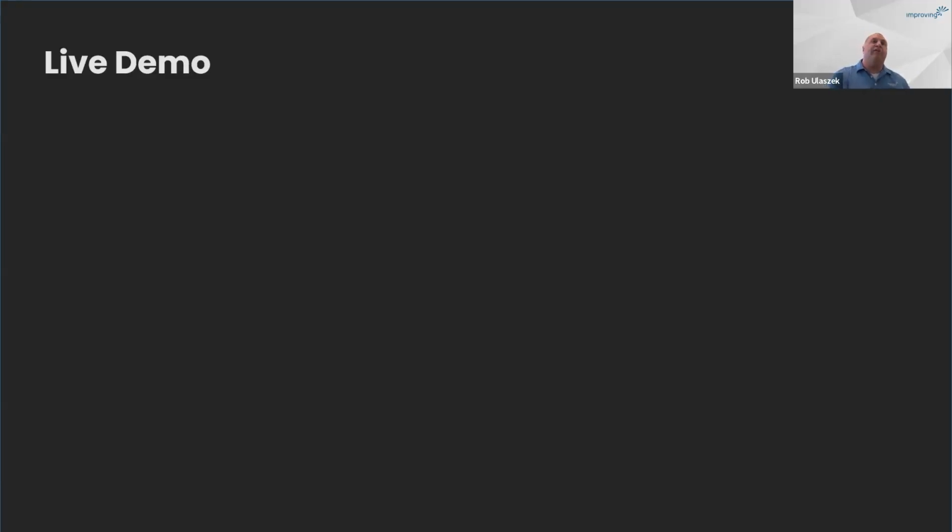You'd have the developers building their code, and then at certain points they'd hit milestones and want to update people who are managing the overall development project. But what's really cool is when we use the P4W Power App, there's actually a way you can integrate these two. There's a sync process where you can configure it so that certain tasks in ADO automatically update Planner plans. Again, as a developer who often gets asked, is it ready yet? This would be a great way to automate that by tying those two tools together.